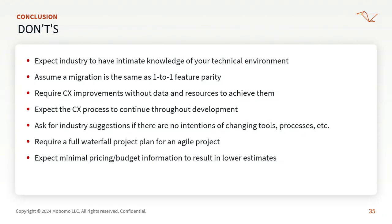Unfortunately, we've seen that a few times, where we're doing design up until a month or two before launch. The development team is coding something one way, the design changes, and they're recoding it. That customer experience design process does need to come to an end, and there needs to be time to get it finished and built out, so it can't continue all the way through to development.